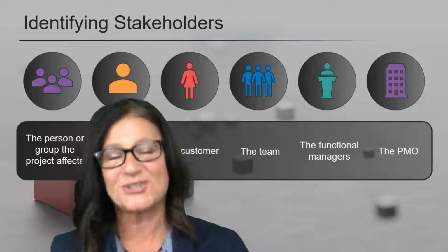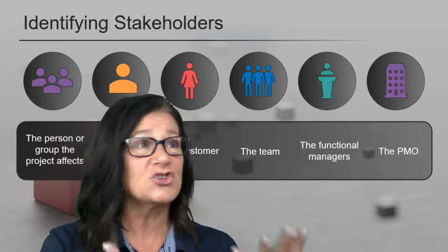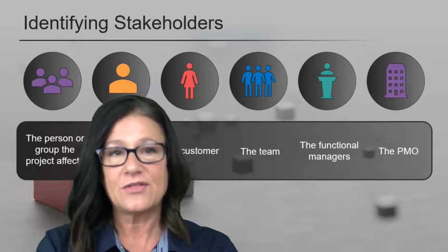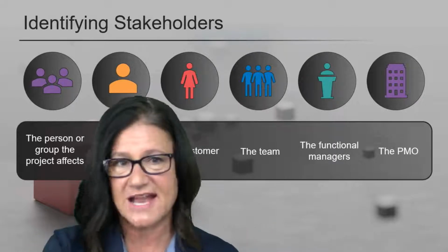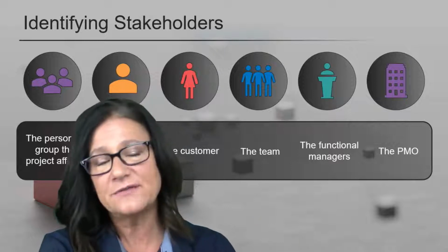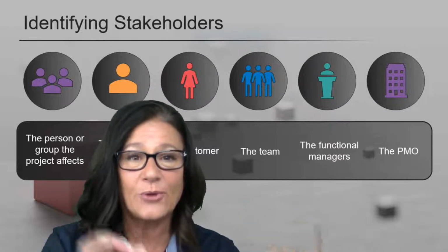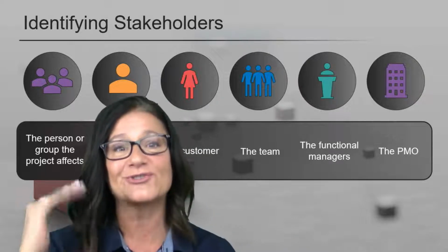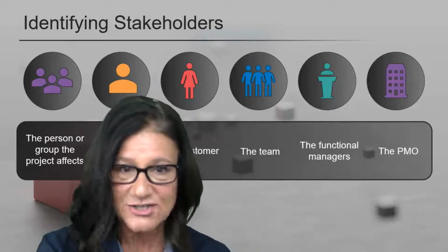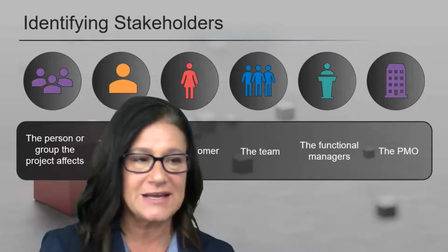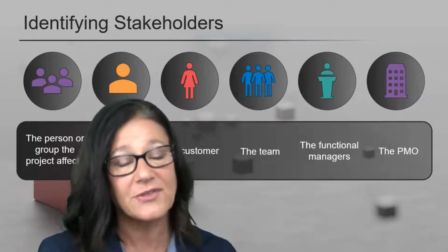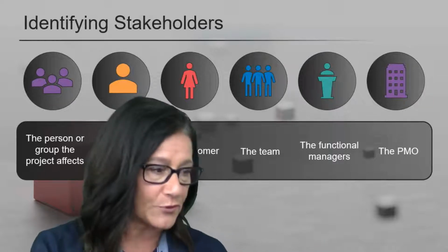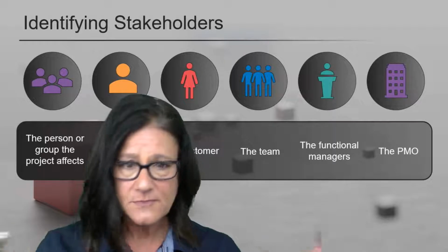Commissioners court acts as a change approval board. All right. So the controlling PMO says, we've got everything the supportive does, but you must use these reports, this software, this is how we update meetings. Directive, you're like reporting to them. They are directing how you do it. That doesn't mean you're not in charge. You are of your projects, but they're telling you, here's the rules, here's all the documentation that we need. So they do come in a variety of different control functions, but they are considered a key stakeholder. The change control board is what PMI calls it, change approval board, commissioner's court, whatever it is, same thing.